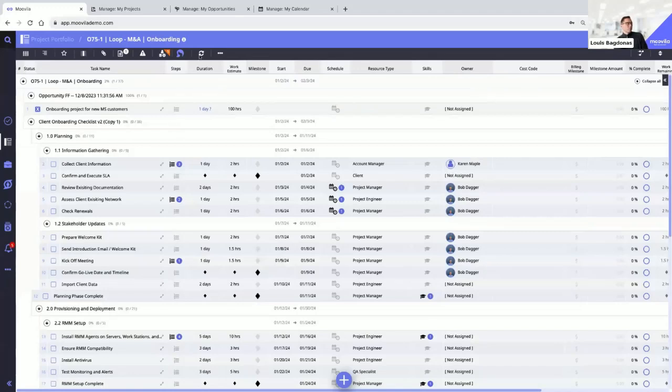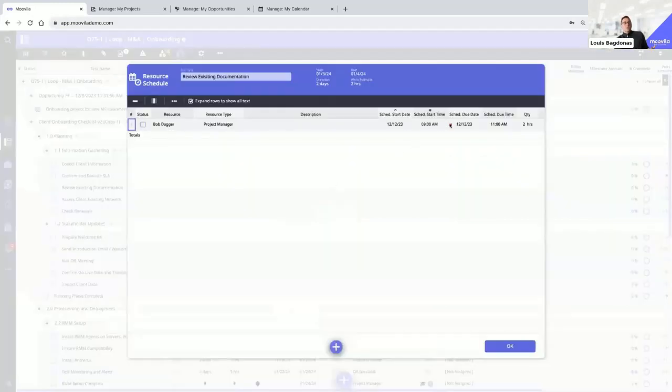platform. Now, as Mike mentioned, also providing the visual and the view to say, okay, I've scheduled the work. The plan's now changed. Where am I at? What can I actually work on? What can I do? Right? So I've put all this time on Bob's calendar for next week, and I'm going to say, hey, now all of these scheduled events that we put on Bob's calendar for next week, these are out of sync. They're invalid. Based on this new start and due date of this project, which then recasted the start and due dates of all the tickets, Bob can't start working on this next week. It doesn't make sense, right? We need to push this out to 1/3.